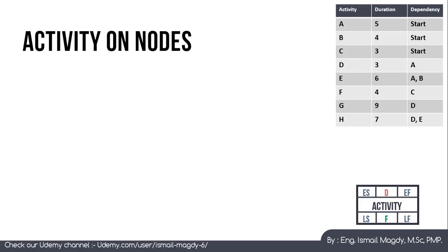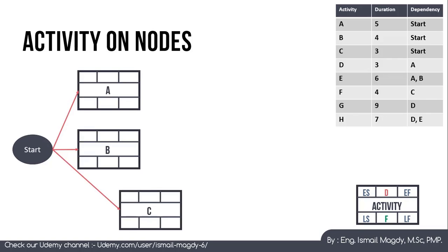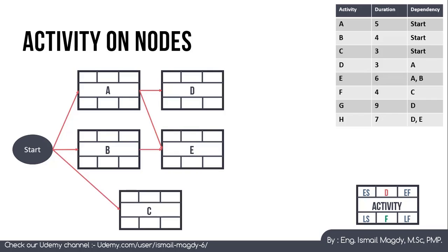Now let's work through an example. We have a table listing activities with their durations and dependencies. We need to determine the critical path, the project's overall duration, and the float for each activity. We start by plotting activities and dependencies. Activities A, B, and C all depend only on the project start. Activity D depends on A only, and activity E depends on both A and B. Activity F depends on C.